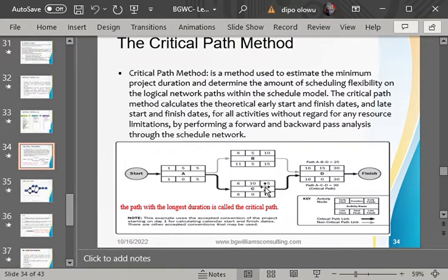the critical path method, because this is very important in every scheduling of a project. What is the critical path method? The critical path method is that aspect of the project that simply explains to us that there is a network diagram, and in that network diagram, the path with the longest duration is referred to as the critical path, and it is also the path that contains the shortest time the project can be completed.